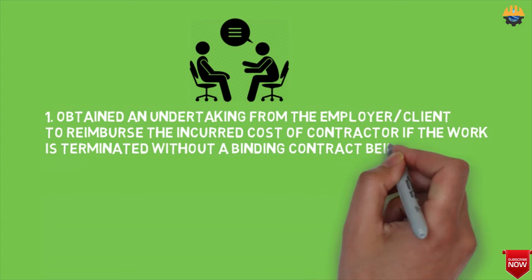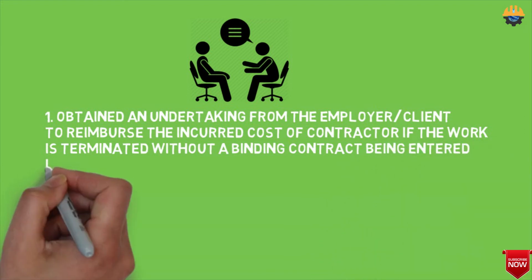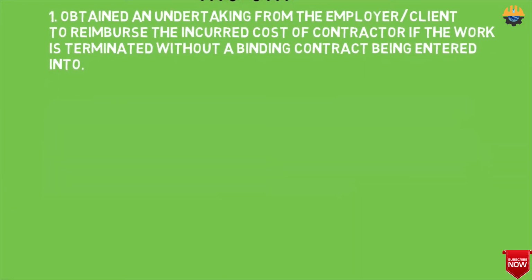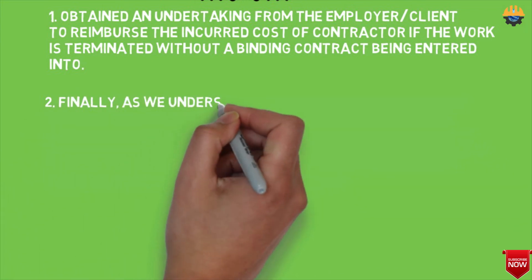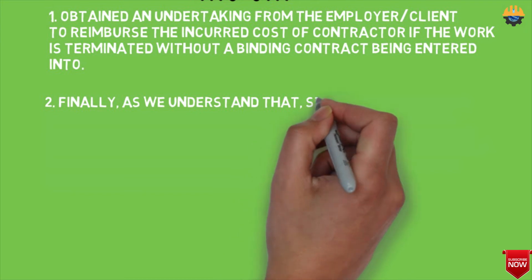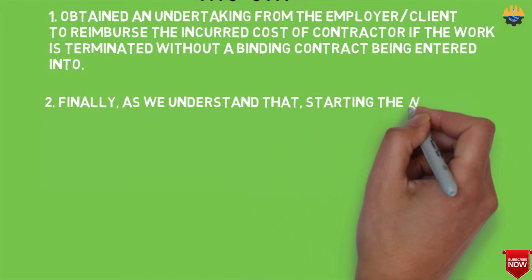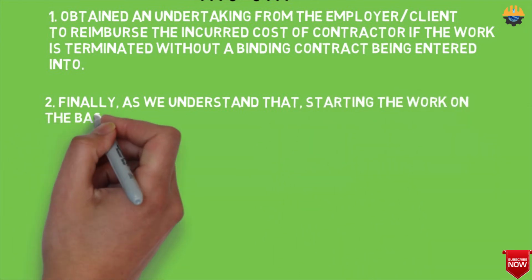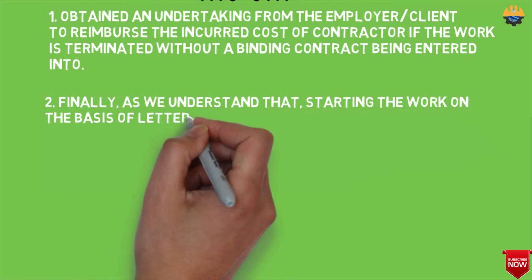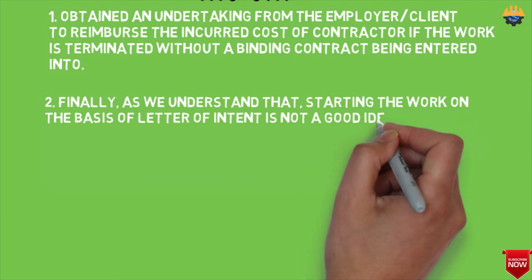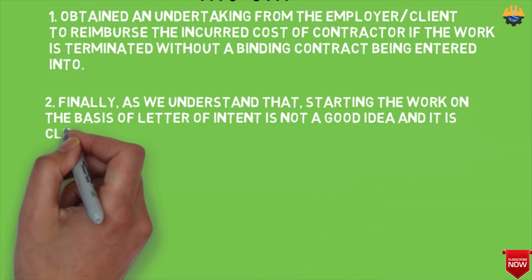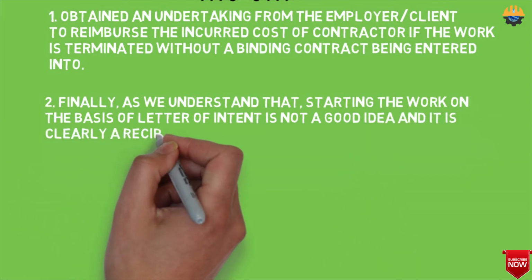So there is also the matter of appointing persons for the project. Such actions will normally involve major financial commitments and require an undertaking from the employer or client to reimburse the incurred cost of contractor if the work is terminated without a binding contract being entered into. So finally, as we understand, starting the work on the basis of a letter of intent is not a good idea and it is clearly a recipe for litigation or dispute.